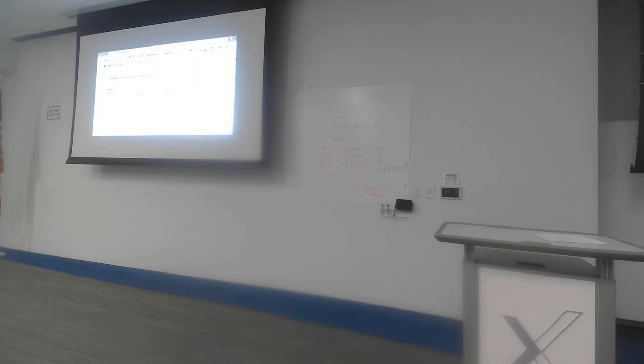To give you an example of how to keep track of my costs, I'm going to fill in the first line straight away. I'm going to fill it out for the normal duration before I crash any of the different activities. So the normal duration of the overall project, based on the critical path that I see here before me, highlighted in red, is the sum of all of the different activity durations that are on the critical path. That is the overall duration of any project that you have. So to find out what the overall duration of the project is, I'm going to add up all of those different activity durations. So 2 plus 3 plus 10 is 15, plus 3 is 18, plus 2 is 20.